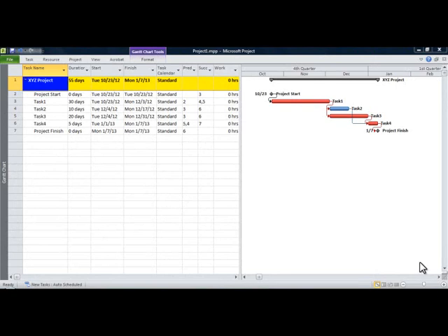Well, it gives you some information about what it would take in resources to complete the project as a whole, and also what the resource requirements are for each individual activity. It will also weight each activity for determination of percent complete of the project. This will help you build your progress curves. So we need to start by setting up a resource dictionary and then applying those resources to activities.